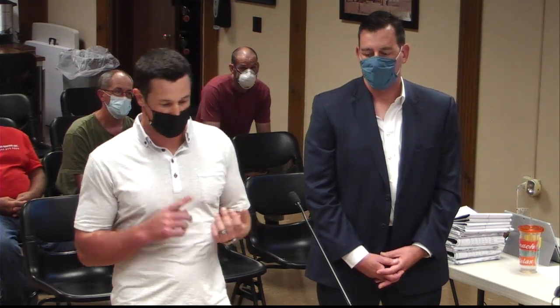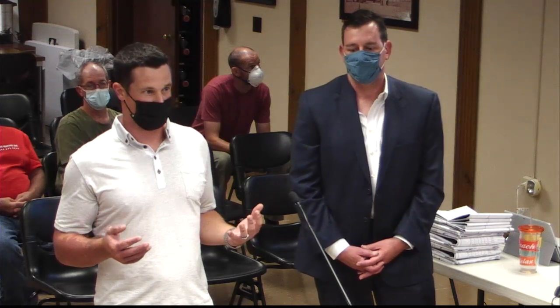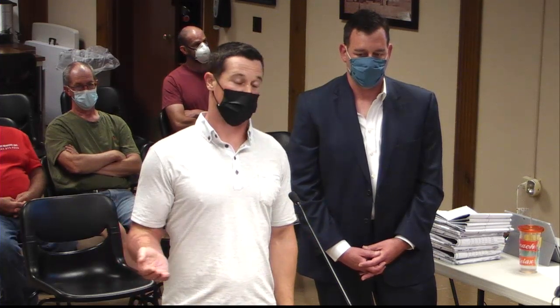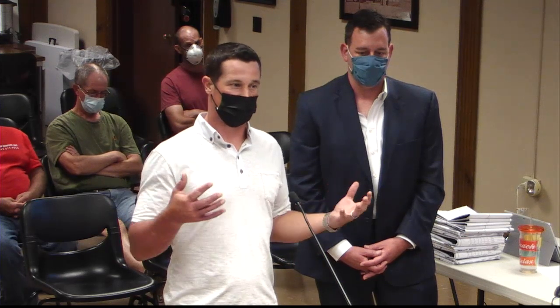So I think what we do have in common with some of the projects that you've seen tonight, one of the biggest things we try to do with these community solar projects is understand that we're in Westchester and there are residential abutters here. I know you guys are seeing a huge wave of projects like this come through because you've just opened your solar ordinance. One of the things we look at is interconnection viability to Con Ed's infrastructure. Just because someone has a farm doesn't necessarily mean that the power lines adjacent to that farm can host a project. And once a project is filed and installed on that location, multiple projects usually can't exist on that same circuit.